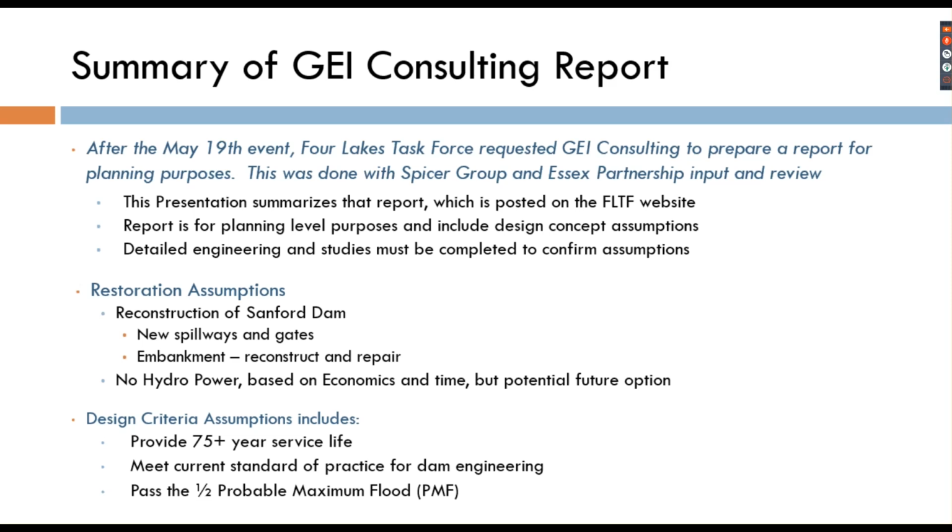This initial assumption is based on economics. Obviously, it's going to be more expensive to rebuild hydro, and then there's the amount of time that it would take. This does not mean that hydro is completely off the table, but at this point in time, it's not included with the restoration assumptions. Several other important factors for design criteria as the Sanford Dam and all the dams are being considered: we're looking to make sure the dams have a 75+ year service life.